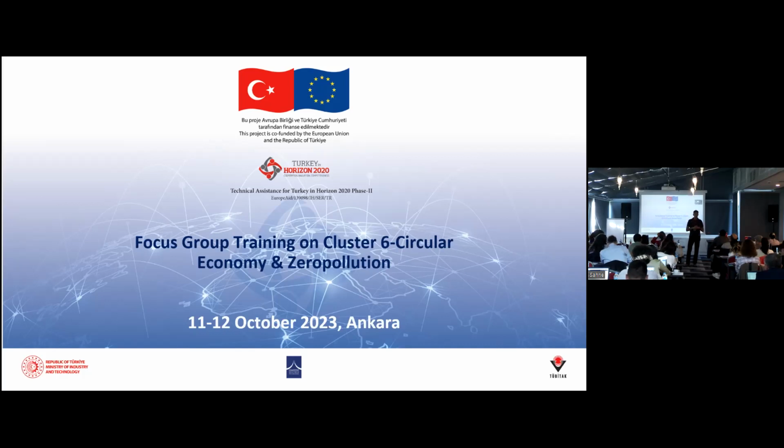And we talked about the risks. She gave you already some risks. And what we added on top of that is that we need to have risks per what? Per, you remember? Risks per what? Per, or a little bit wider, per work package. So that means that each work package leader is responsible at least to specify their own risks. So if you're a coordinator, you ask your work package leaders to give you their own risks that they believe should be applicable in their own work package. Or if you are a partner and you are a work package leader or even a task leader, you indicate what will be those risks that you believe can be applicable in your case.